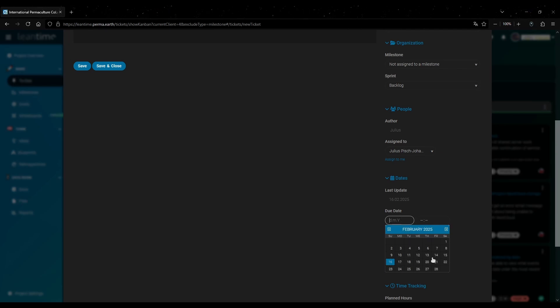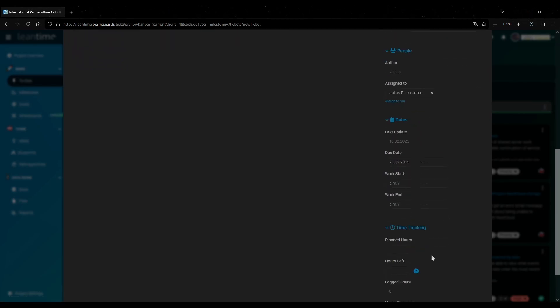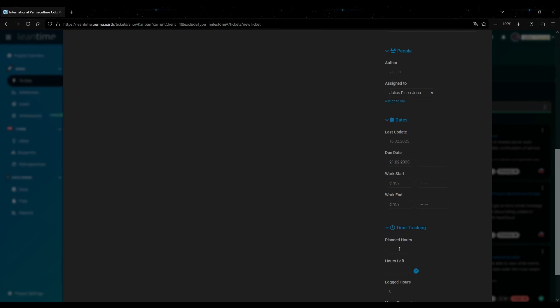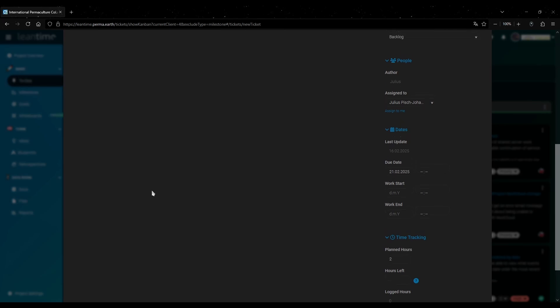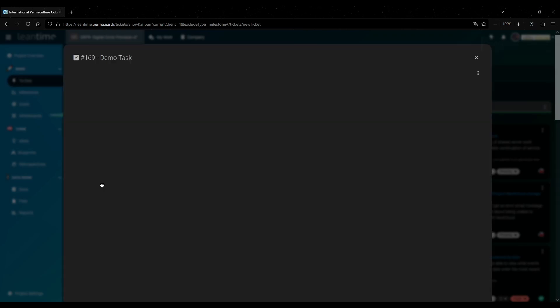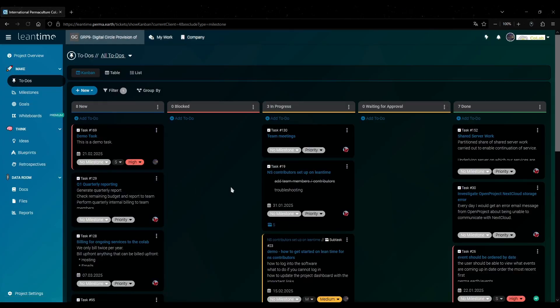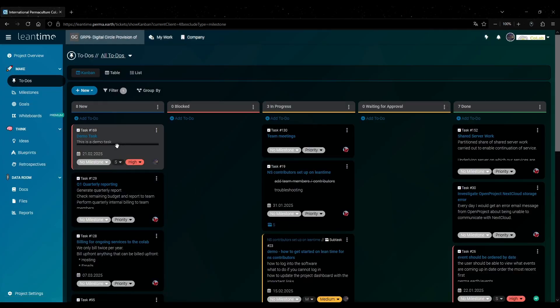When you scroll down further you can also set a due date for the to-do. Let's say for example next Friday. And below that you can set how many hours you think it will take. For example two hours. And as always don't forget to save. And now you can see it popped up right here.